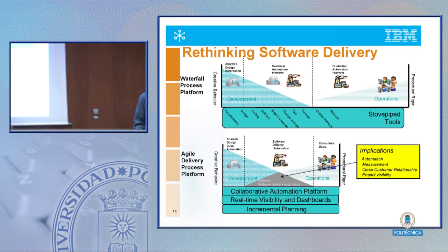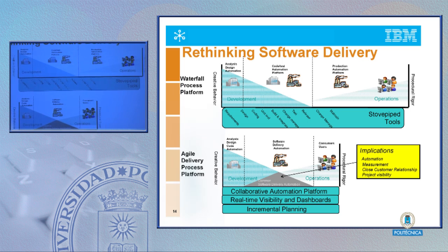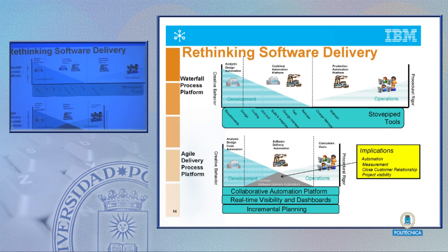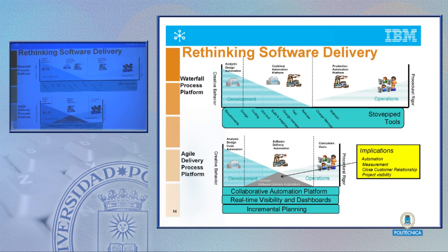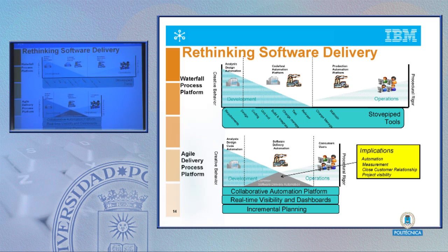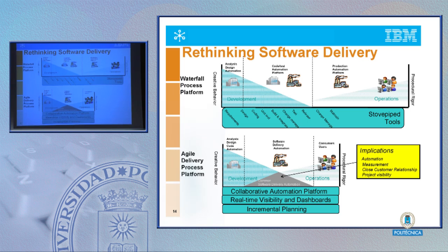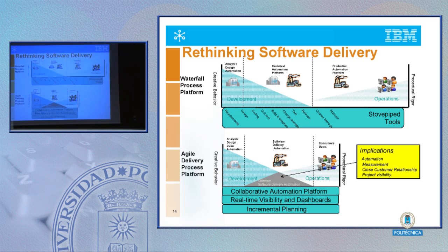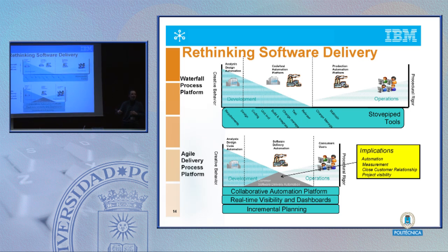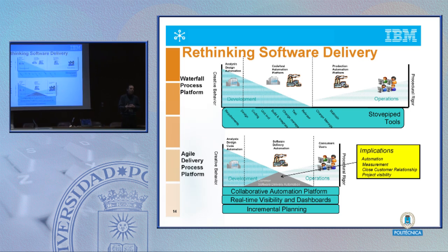Okay, you don't have to think about architecture any less. It's still important. You've still got to write as much lines of code, maybe, more or less. And you've still got to test it as much. So these two, the top one seems to have moved. These two parts of the V, you still have to do them, but now you've got to collapse them. You've got to start to do things earlier on, not wait until the code's more or less done before you start to do too much testing and documentation, integration management, starting to get acceptance tests. Push those early. Start to think about testing early. Start to do test-driven design.